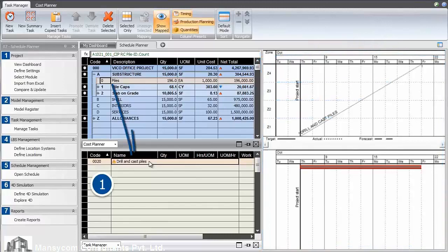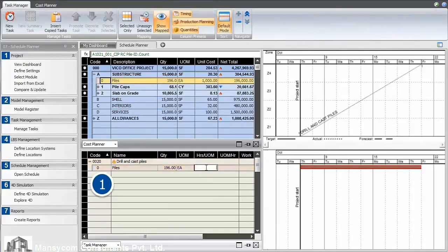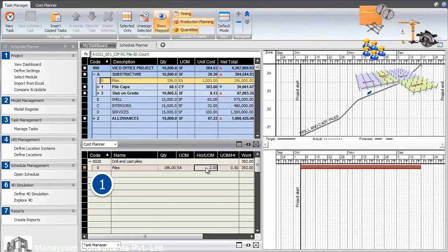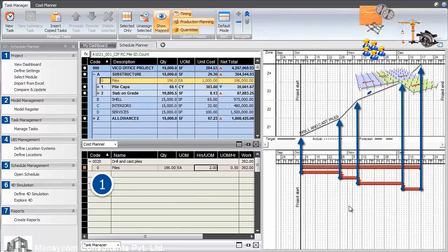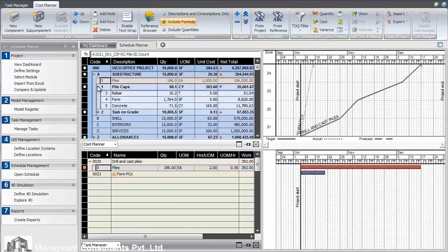By dragging and dropping from the estimate, we're going to leverage the integrated workflow and exploit any of the work already done by the estimator. The task is then loaded with quantities, costs, and resources for each location where there is work. We see more accurate scheduling because of the calculation for each duration in every location. Because of the varying quantity of work, we have a different duration.